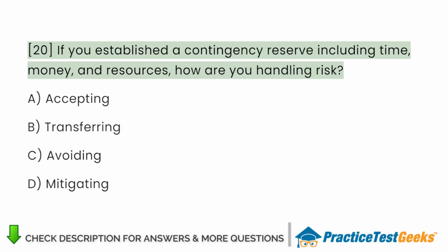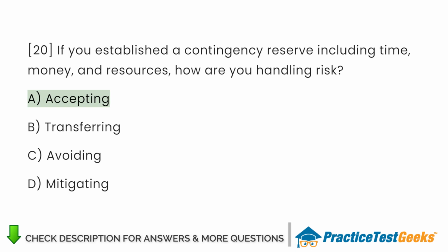If you established a contingency reserve including time, money, and resources, how are you handling risk? A. Accepting. B. Transferring. C. Avoiding. D. Mitigating.